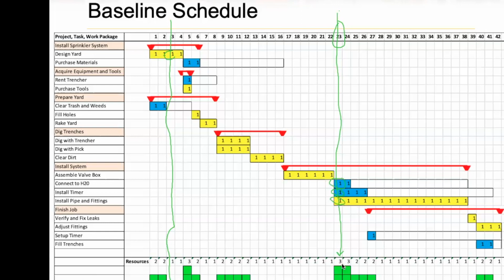And as you can see, I have 3 blocks over here. What does that mean? 2 people are working on this project, but I have 3 cubes collapsed on that resource data. More labor is needed than you have. Yes, I need 3 labor hours. I have only 2 because it's me and my son.